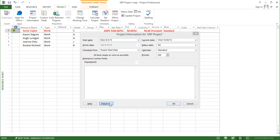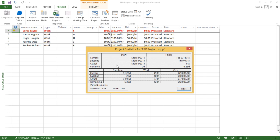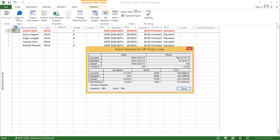Because I've assigned resources and I have a rate for them, it means that not only do I have work in hours, but I also have a cost. My baseline cost is $40,000. So far I've spent $37,000, but I'm projecting on spending a remaining $12,000. So this $37,000 plus the $12,000 means that my current value I think I'll be arriving at is $49,000. I've got about a $9,000 delta—I'm over budget by $9,000.